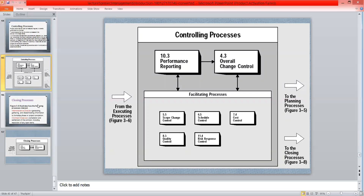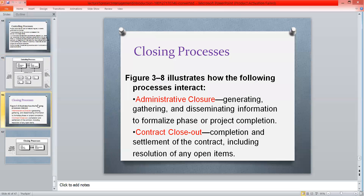The closing process: after completing the project and obtaining the desired product, we can successfully close the project. A project can be closed through two types: administrative closure and contract close-out. In administrative closure, we gather and disseminate information to formalize the phase and project completion.